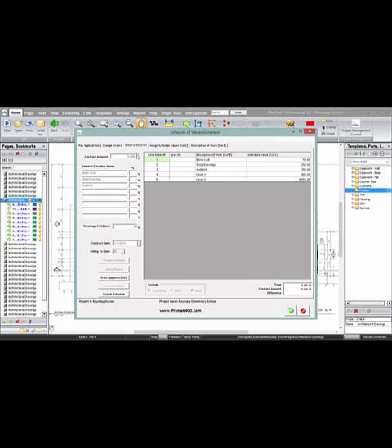The balance of the contract, after those are deducted, would be distributed equally and prorated based on the value from the estimate, plus any difference that's left over, plus or minus. And that's all done by merely clicking Create Schedule. In some cases you might have to round or adjust some items, and then you would print that form, send it in for approval. Once it's been approved in its final state, we'll lock that.